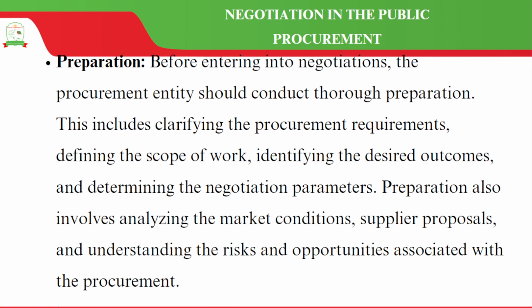And then we go ahead and do preparation before entering into any negotiations. The procurement entity needs to conduct a thorough preparation, and this is going to include clarification of procurement requirements, and we do this by defining the scope of work, identifying the desired outcomes, and determining the negotiation parameters.